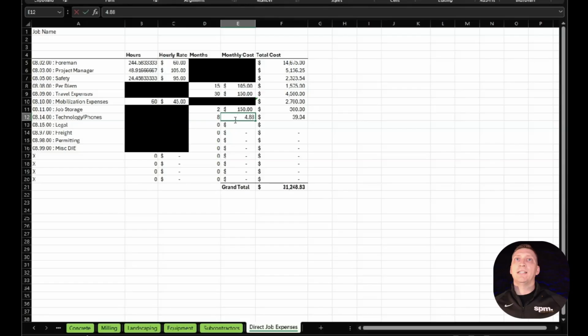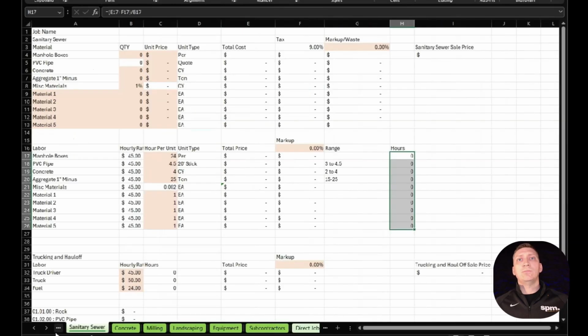Actually, that's per day, so we're going to do equals 30 times 488 there. So you have a phone allowance, legal. If it's your first time working with somebody, you might put in $800 to review the contract. That way you're going to recoup some of the stuff. Otherwise, again, it's just going to come out of your overhead. But that's this tab.